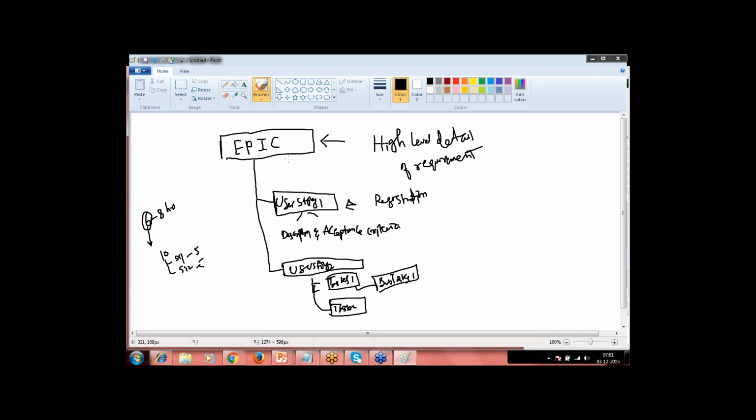So it all starts in the Scrum development model as an epic, what we previously knew as requirements in the SRS, but now that comes as an epic, and that will be explained through detailed user stories. And to achieve those user stories, we create tasks. Sometimes we create subtasks. Now people go and work on those tasks on a daily basis. Suppose you're a test engineer, and while executing something you found a bug, then under that user story you create bugs also. So what you do under the user story is you create a bug.